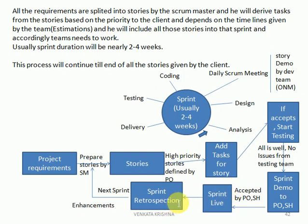After the sprint goes to production, there is a sprint retrospection meeting. In this meeting we discuss what went well and what went wrong in that sprint. Mistakes made in the current sprint should not be repeated in future sprints — it is essentially a lessons-learned session. After retrospection, the next sprint begins and the same process repeats: stories, tasks, story demo, testing, and so on.